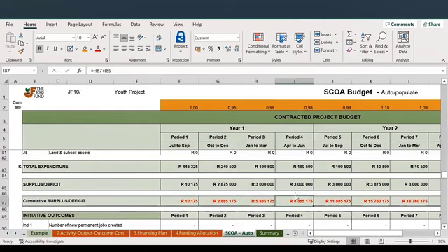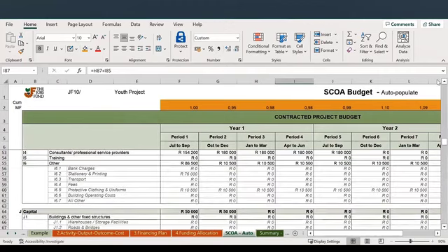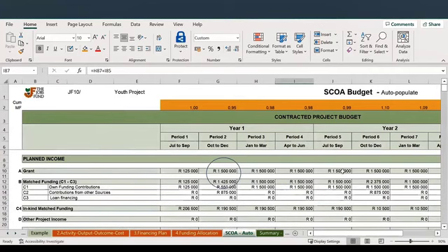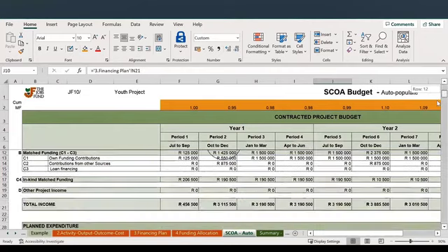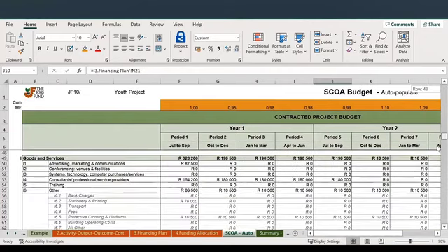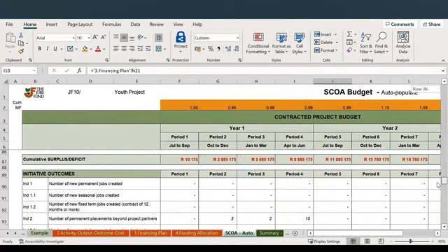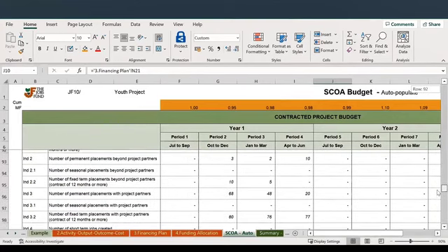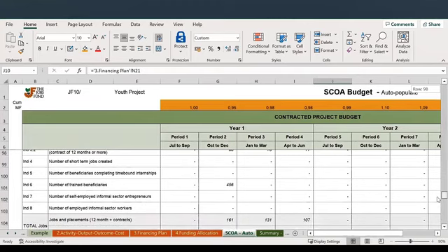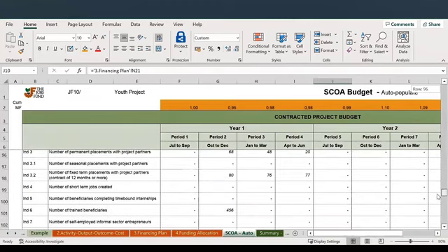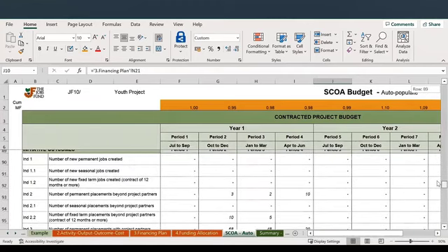And like we said, if you sat with 8 million rand in this quarter in period 4, and you still said to us, oh, please release the 1.5 we budgeted for in period 5, we'll say absolutely not. Can you show us that you're actually going to expend that 8 million plus 1.5 before we release it? We won't just release money into your account. But there is an opportunity cost, of course, and we can allocate it to others that have needs for the funds.